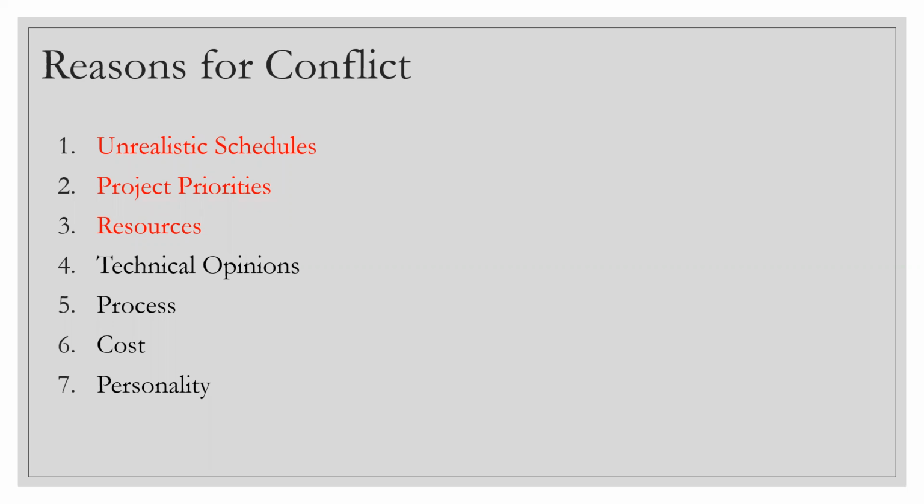And in fact, in many companies, if they release a charge line in the beginning of the year, there is no way that the charge line can be modified, unless a very senior person, not even a director, but a person of the VP level steps in, and they agree with the new inflated charges.